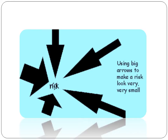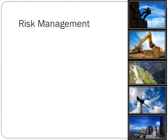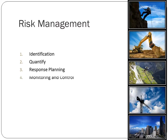This slide is a little facetious, but it captures the essence of the situation. If we focus everyone's attention on everything else surrounding this particular project plan and schedule, then the risks will essentially disappear out of everyone's mind. Effective risk management involves identification and recording of risks, quantification — because if we cannot quantify, we can't understand and measure — planning responses to the risks identified, and monitoring and controlling the risks.